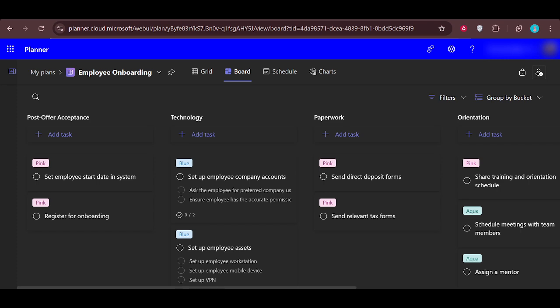First, look near the top of the window for the option related to how your tasks are grouped. Depending on your version and layout, you'll see a label or drop-down called Group By. When the project is grouped by priority, that drop-down will usually say priority or something similar. This means that instead of showing tasks arranged normally, they're being sorted and displayed based on their priority values.